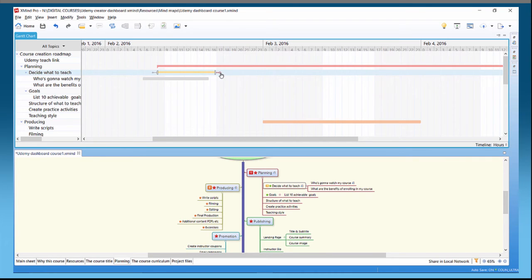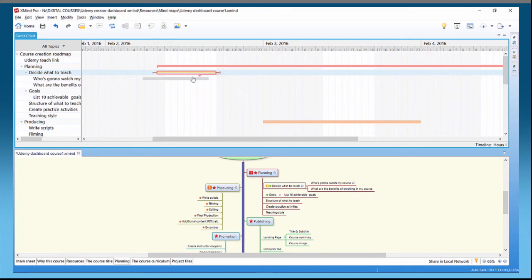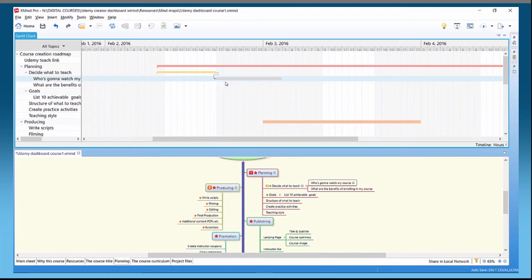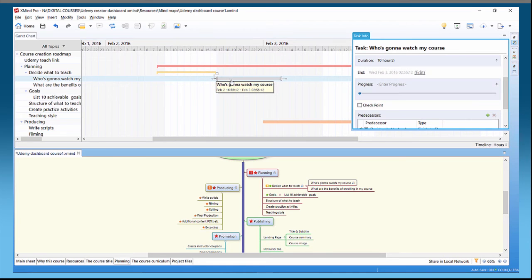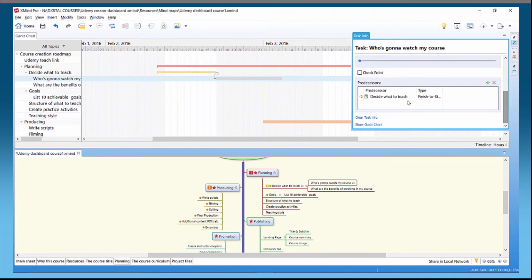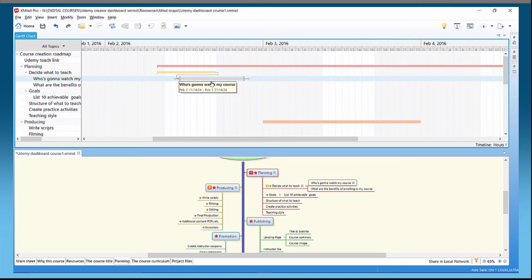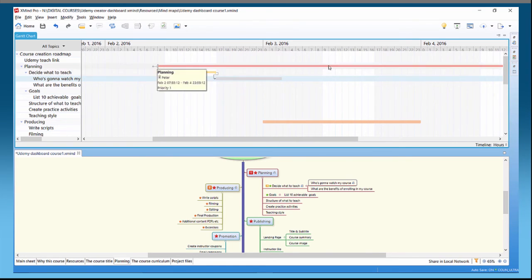We want to make sure 'Decide What to Teach' is finished before 'Who's Going to Watch My Video' starts. We can drag this bar to the front and it immediately pulls the next task along. If we double-click on 'Who's Going to Watch My Course,' we can set a predecessor — 'Decide What to Teach,' finish-to-start. Now however hard I try to move it back, because of the dependency it always jumps forward.